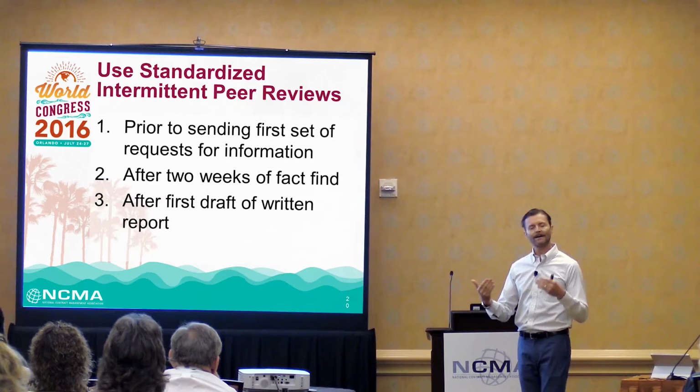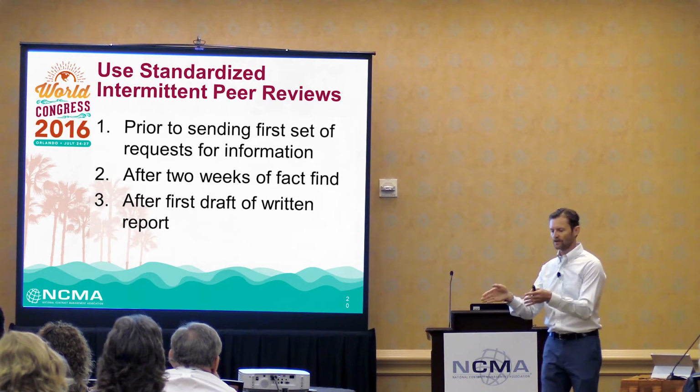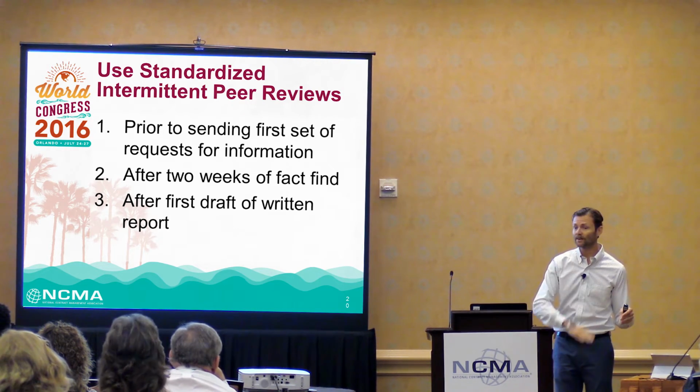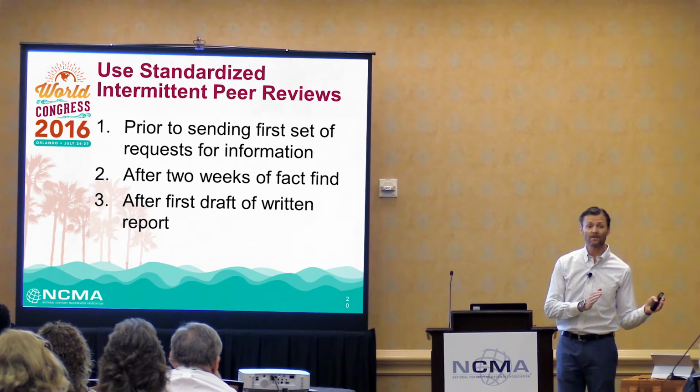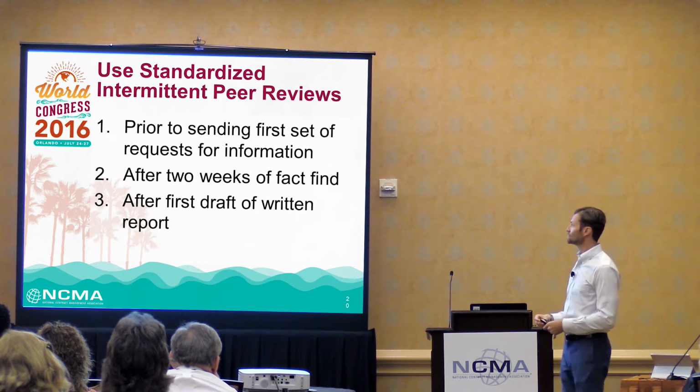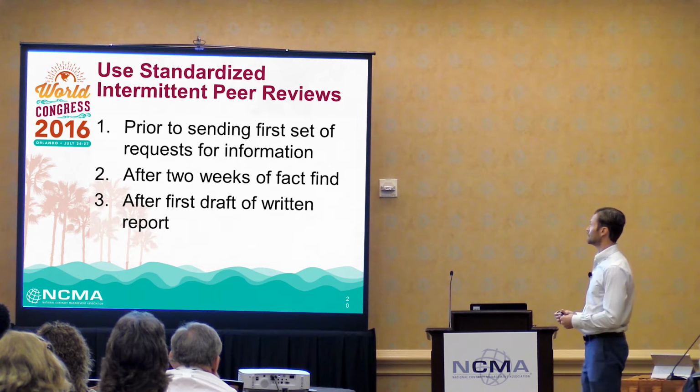So we get another analyst to come in, do a very quick look at the proposal and the RFI questions, and just make sure that all of the cost elements have been addressed in that request for information worksheet. Now you have some feedback if you're going too deep or if you've totally left something out, which means you have to go back to the supplier more. Every time you go back to the supplier, it's going to add at least a week of turnaround to get answers back. So that's the first time that we do peer reviews.